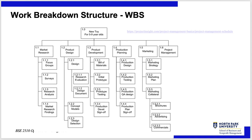Here's an example WBS. The project is to make a new toy for five-to-nine-year-olds. At the top level, you do market research, product design, product development, production planning, marketing, and project management. At the next level — the first decimal place — you break each of those down. For example, product design breaks into focus groups, design, bill of materials, production design, and marketing strategy. You could argue for more or fewer categories, but this gives you the structure. Each of those top-level items could be a mini project.